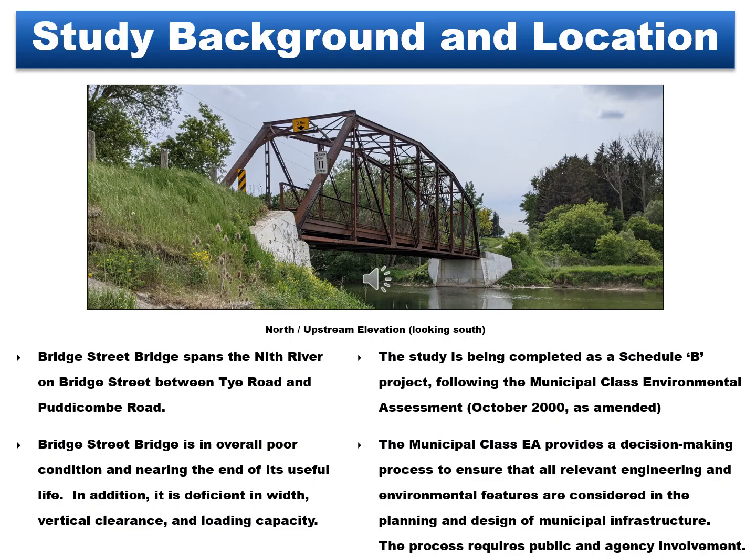Study Background and Location. This slide includes a photograph of the Bridge Street Bridge, specifically the north or upstream elevation looking south. The Bridge Street Bridge spans the Nith River on Bridge Street between Thai Road and Puddicombe Road. The bridge is in overall poor condition and nearing the end of its useful life. In addition, it is deficient in width, vertical clearance and loading capacity. The study is being completed as a Schedule B project following the Municipal Class Environmental Assessment, October 2000 as amended, which provides a decision-making process to ensure all relevant engineering and environmental features are considered in the planning and design of municipal infrastructure. The process requires public and agency involvement.